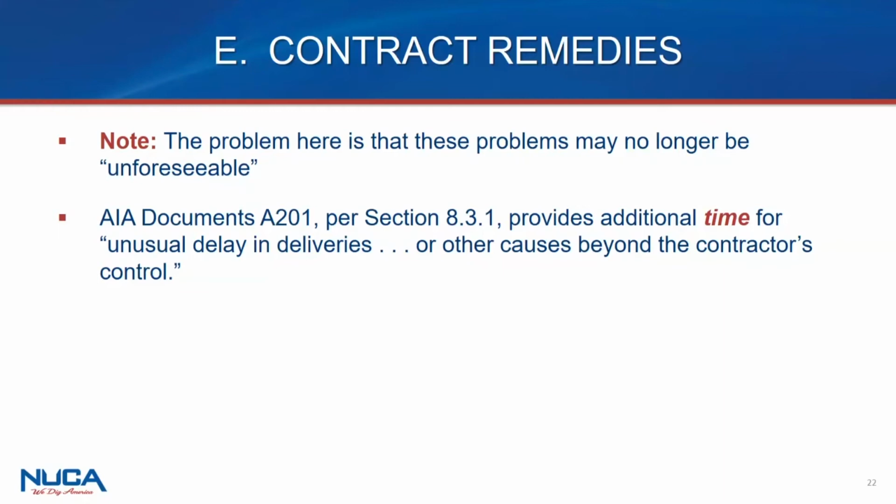But another thing on time, while I'm looking at this AIA contract and that provision, there are often in these contracts no damage for delay clauses, right? But in that situation, it says your only remedy is time. So if you ask for time and get denied time, now you're actually in a pretty good position, because now you can get compensation.